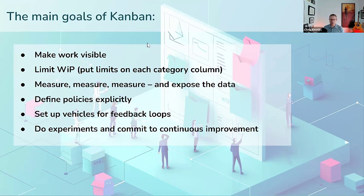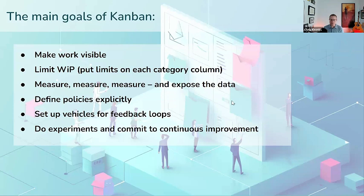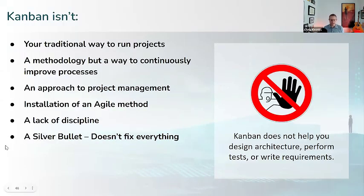The main goals of kanban are: make work visible; put limits on each lane or column of work so we manage each phase more intelligently as it matriculates through the system; always measure so we can make things visible and expose data — there's a knowledge dividend if we expose that data; explicitly define policies so people's expectations are clear; set up disciplined, structured feedback loops; and do experiments so we can collect disciplined quantitative data on what's working and what's not.